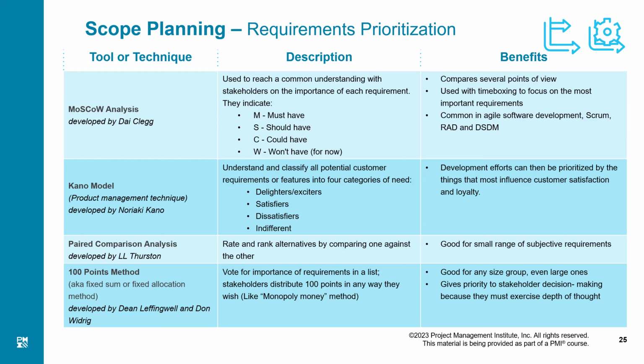Now you can give as many votes to any idea, but you have a limit of 100 votes. Now I may be in favor of only one idea. I can give all my 100 votes to that one idea, right? Or I can give 50 points to one idea, 40 points to another idea, and 10 points to another idea, and I do not vote for the other 97 requirements. That means my votes are distributed somehow.